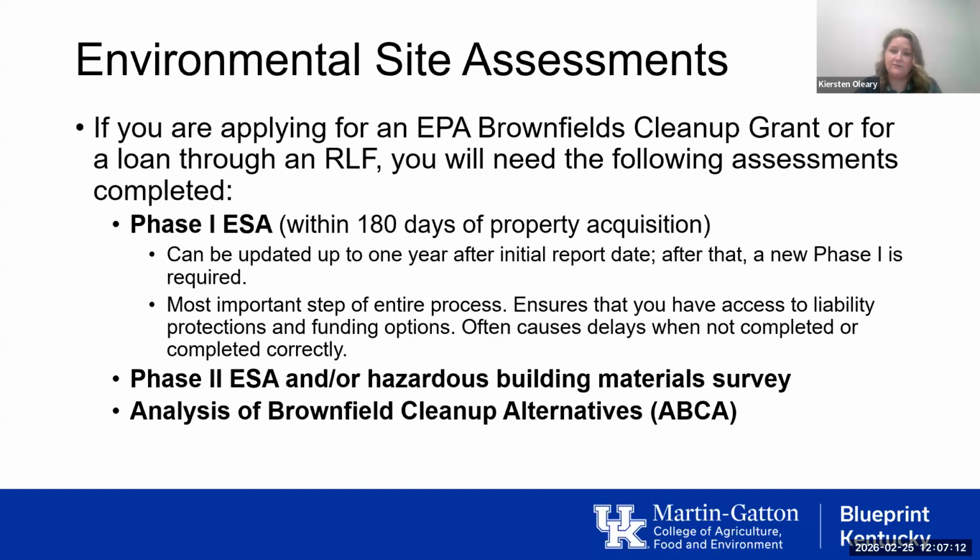A Phase One environmental site assessment, you have to get that within 180 days of property acquisition. That can be updated for up to 1 year. After that, a new Phase One is required. So sometimes we will see that multiple Phase Ones have to have occurred just to get to the starting point of being eligible for funding.